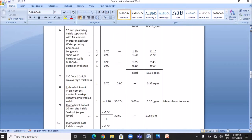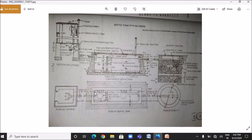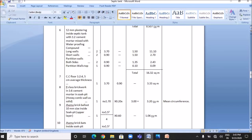The next item is 12 mm plastering inside the septic tank with 1:2 cement mortar mixed with waterproofing compound. For the long walls, the plastering length is 3.7 meters. The height is 1.2 meters plus 0.3 meters, equaling 1.5 meters. The number of long walls is 2. Quantity is 2 × 3.7 × 1.5, which equals 11.1 square meters.